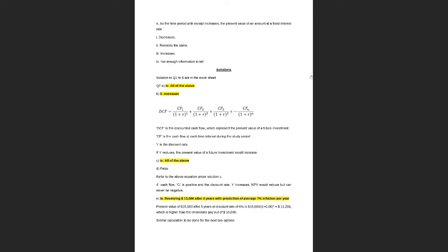So this is my question to him. The scenario is the client has requested some changes in the designs after initial approval, which would delay the authority submission date by 2 weeks. Some of you argued that 2 weeks is not a big delay, so we shouldn't consider this a top priority situation. But in the solution, it was given that the submission with the design change will be made in December, January, which falls in the holiday season. So this will be considered a top priority situation.